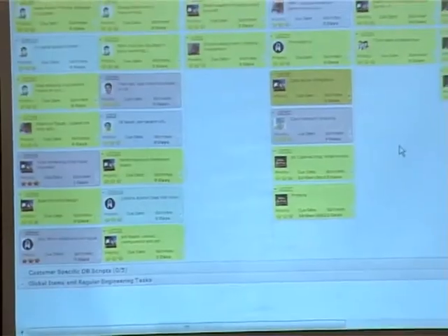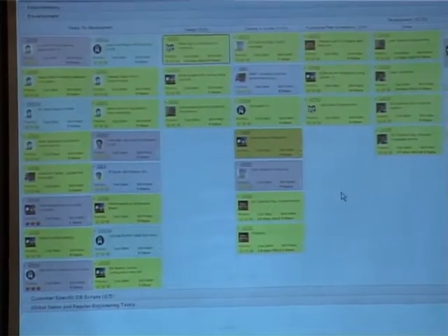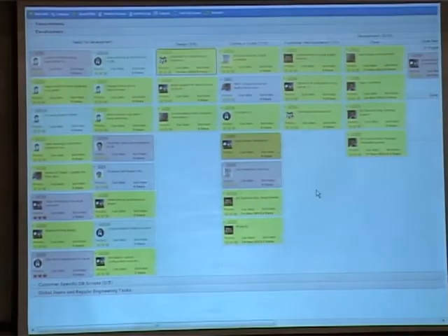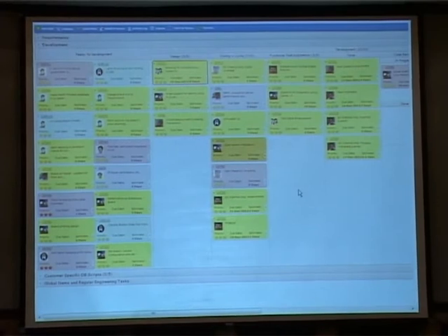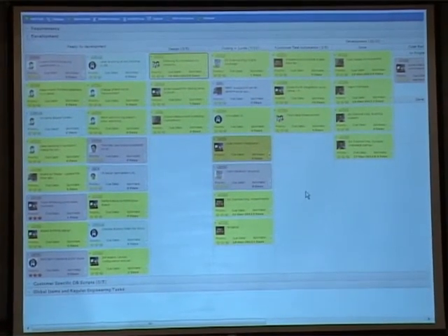And so in our example, yellow is indicative of a user story, red is indicative of internal defects, blue is indicative of a customer defect. And so just by looking again at a glance, I have an excellent view about whether the bulk of my team is doing value-added work or the bulk of my team is doing rework. So you get a one-shot distribution about where your team effort is going at any point of time.